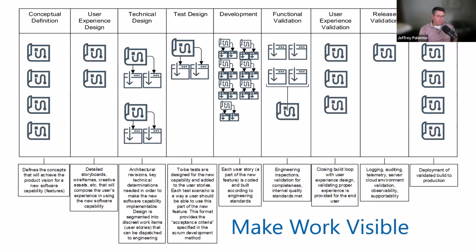But I want to highlight the 4 design decisions ahead of the column where you write the code. Even if you want to call them different things, that really doesn't matter, but you need to make 4 design decisions. You need to define the concept. Why are we doing something? Defining why equips and empowers everyone in the development team to question why we're doing it, because we might be able to simplify something and maximize the amount of work not done.